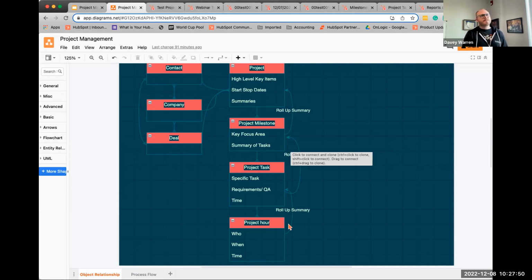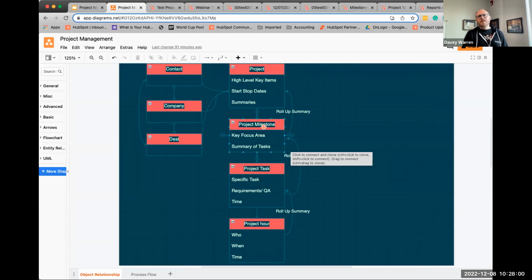We are sharing this presentation, so you'll be able to go back and see this. If there are other ways, from a retainer perspective, all you need to do is change, you could have a milestone that could have a type. You can mark the milestone as hourly or a fixed cost. And then you could still log project hours to it, knowing that if it's a fixed cost, it's just how many hours did it take to do that fixed cost.